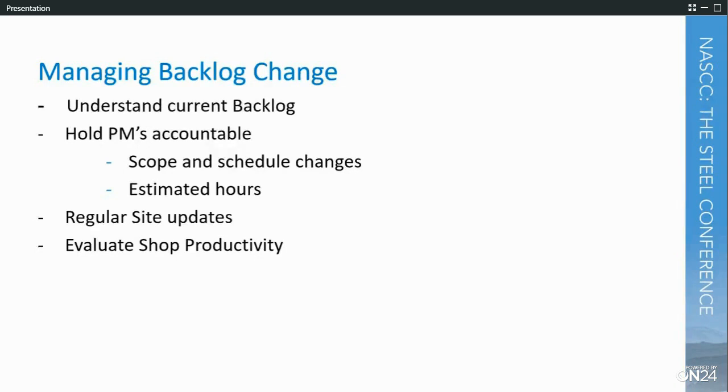Like I said, we get regular site updates, and then we go through and we evaluate our productivity on a regular basis, especially when we have larger projects where the duration might be a 20-week project. We'll get through the first maybe 4 weeks of that project, and we'll say, okay, how are we doing on the productivity side? How is our production versus the estimated hours going? And let's say we're trending 15% under the estimated hours. We'll dig into the detail. We'll understand why we're 15% under the estimate.